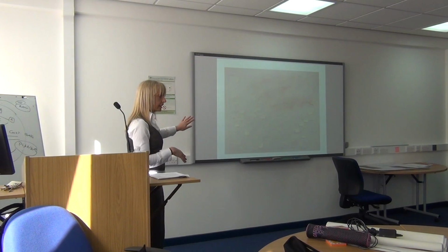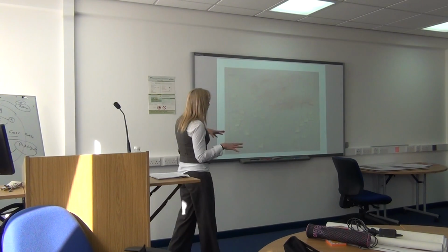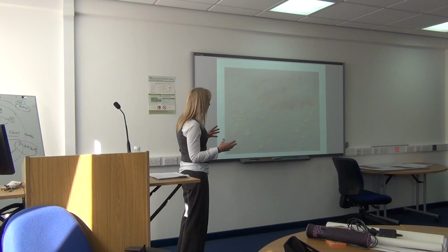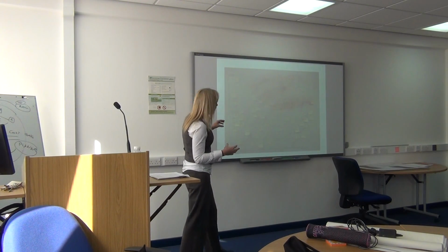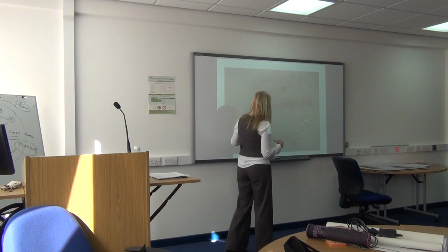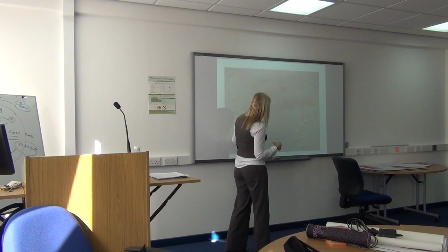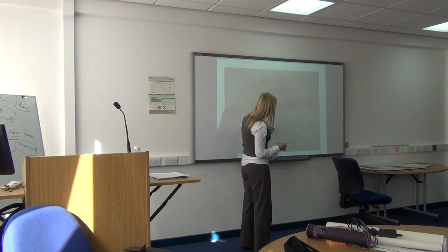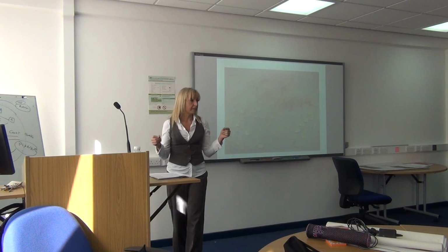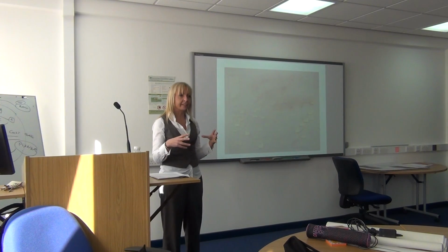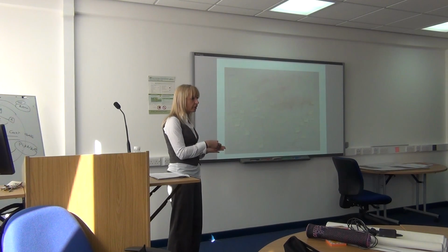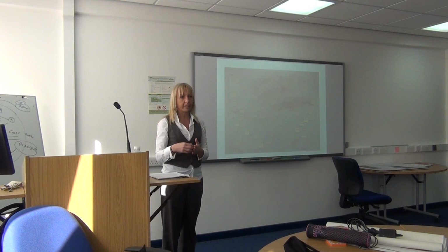Because what this network analysis throws up is that people who have a lot of lines going to them, obviously this one's already up here, but people who have a lot of lines going to them, or a lot of arrows going to them, or coming from them, could potentially identify stakeholders that were not necessarily first deemed as being important or having much power.